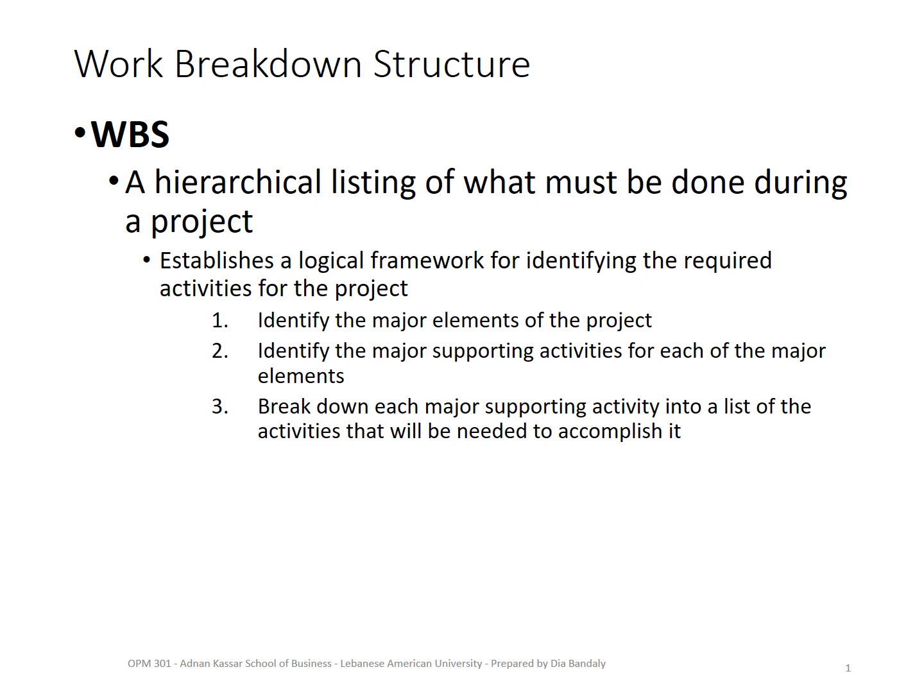And to do that, we implement a very important tool called the work breakdown structure, WBS. As the name implies, you break down your project into smaller and smaller components, and these components into smaller activities, and these activities into smaller tasks, until you reach a level where that's it. You cannot break down this entity anymore. So you come out with a final list of your activities. Okay, this is exactly when you can start planning your whole project.